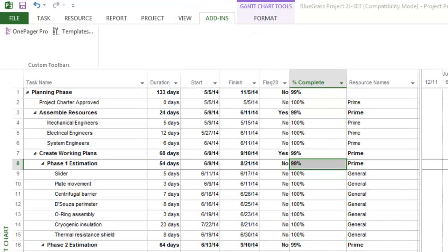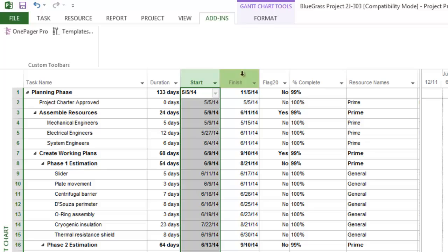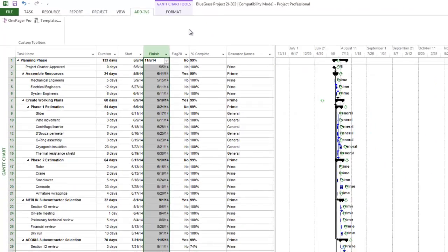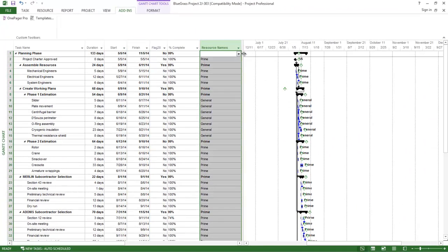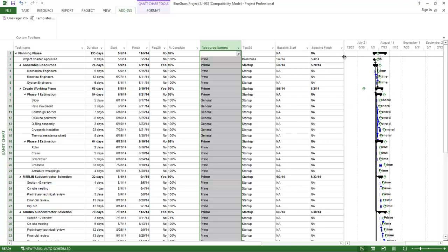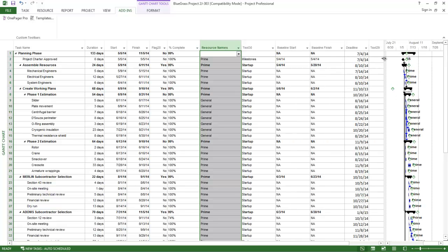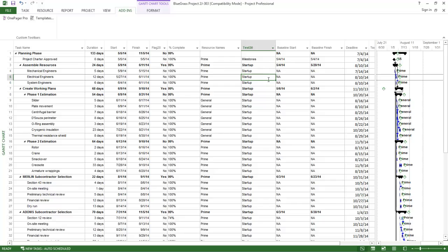Your source project or Excel file, at a minimum, should include task name, start date, and finish date. But you can pull in other columns like resource names, other text columns, enterprise custom fields if you're using Microsoft Project Server, baselines, WBS codes, just about any column from your project or Excel file to use for display or organization in OnePager.